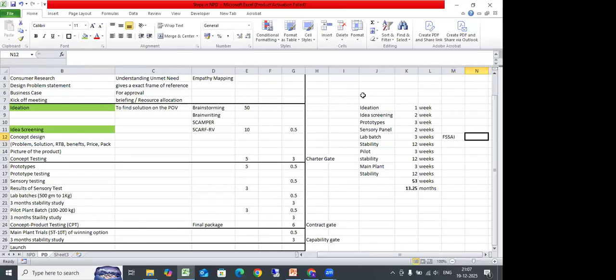So there are many parallel activities you should do. Basically, the packaging activity should also start somewhere here when you're prototyping. Development of packaging will take time. The brand manager is here, Kavya. Is she in the call? I think she can also add.